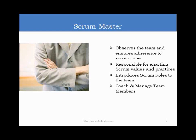The team passes through three stages: Shu, Ha, and Ri — Japanese terminologies. At the Shu stage, the team or student just has to follow the rules because they are very new to the process. They don't yet understand the principles and values behind those practices. So at Shu, the team must follow the practices as prescribed by Scrum, and by practicing them they come to understand the principles, ideas, and goals behind those practices.